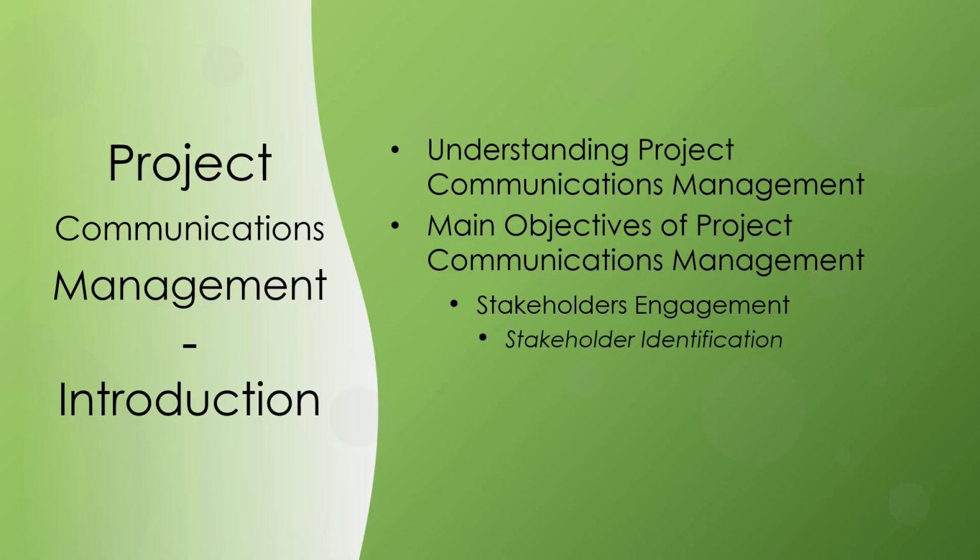In this phase, project managers identify all potential stakeholders who have an interest in the project, including team members, clients, sponsors, regulatory bodies, and the broader community. Understanding the various stakeholder groups is essential to tailoring communication strategies to meet their specific needs. Once identified, stakeholders are analyzed to determine their level of influence, interest, and potential impact on the project. This analysis informs the communication approach for each group, as high-influence stakeholders may require more in-depth communication.